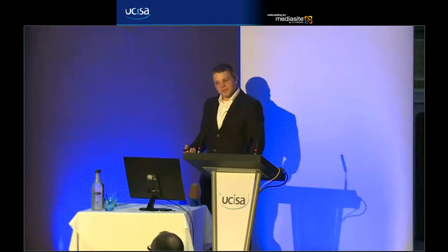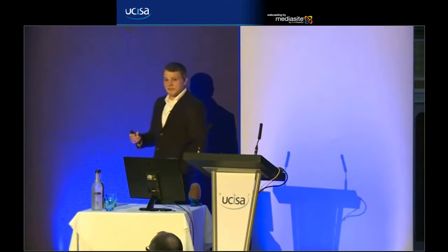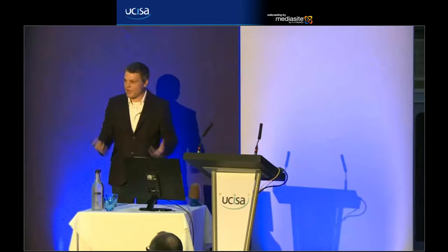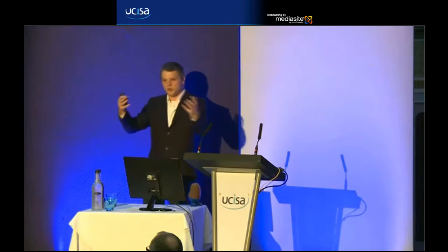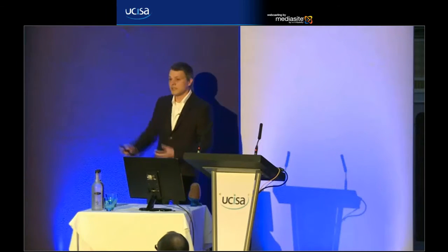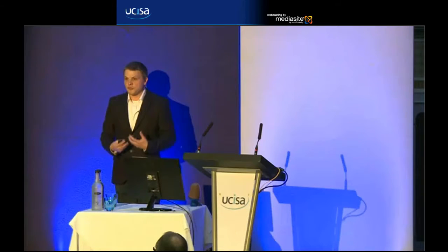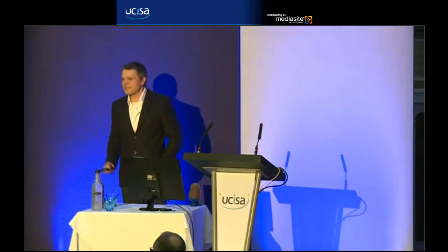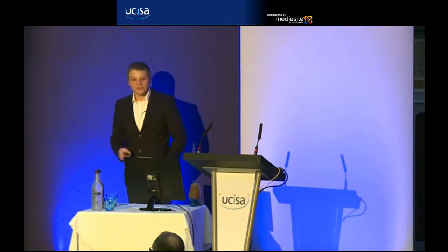So how does this work? Well, we have our team of developers. We've already gone through with the customers and got this set of requirements, the Agile Stories. So we know the high-level requirements for the project. The developers who are actually going to do the project, who are going to do the actual work now, sit down and take each one of these stories in turn. And we have a discussion. We talk about what's involved. Are there going to be web pages? Is it going to be database things? How are we going to actually deliver this? What are the technical aspects to this? Once we've had that discussion, then we have a vote.